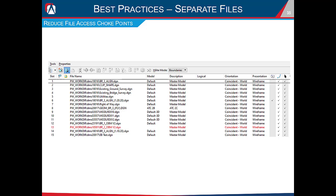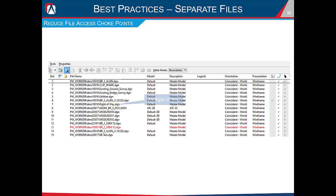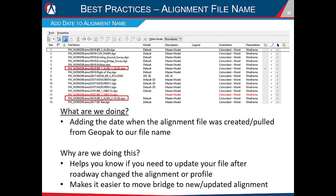Another best practice is to separate your files as much as possible to reduce production choke points. A typical model may reference an alignment file, a clip shape file, existing ground survey, existing bridge survey, 3D utilities, 3D right-of-way, roadway models from the roadway group, and other bridge models. Keeping these as separate files means multiple people can work on different aspects simultaneously, whereas if everything were in one model only one person could work on it at a time.